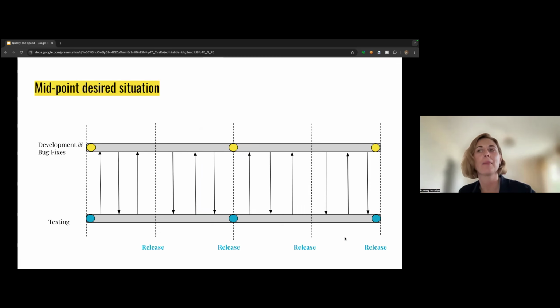We took some approaches from Agile. We started working more closely with developers. We brought design earlier to the team, not just handed over to our teams as a final copy, a final design, and then we have to do things, and then we discover that no, really, we can't implement it. We also worked on making our releases much smaller.